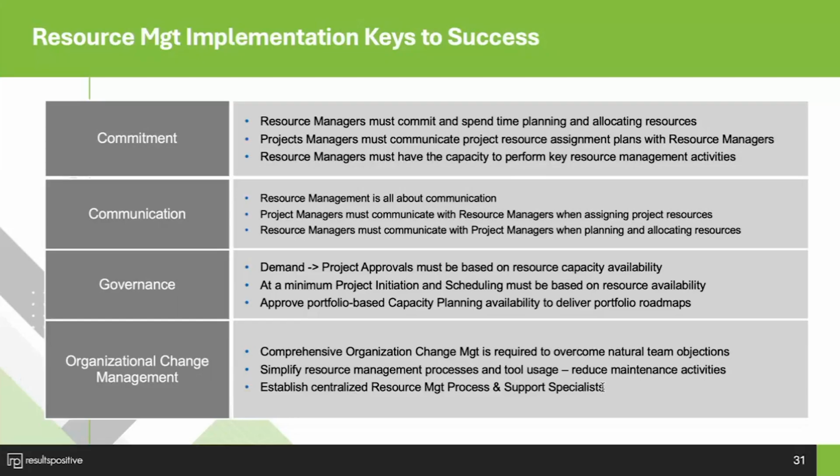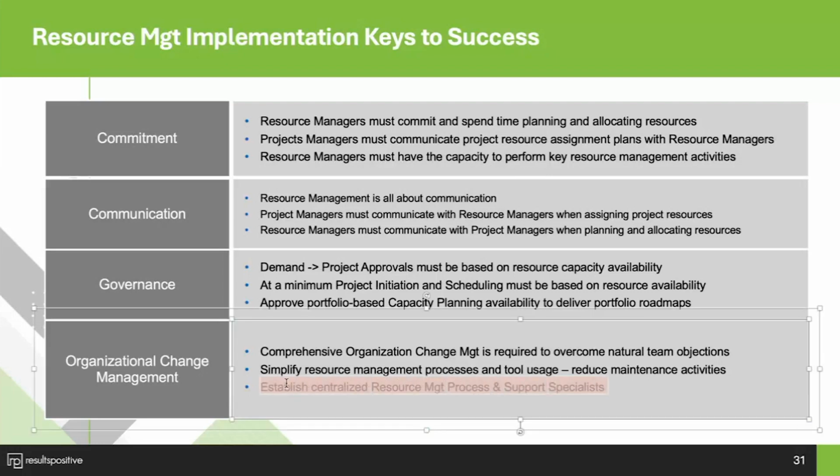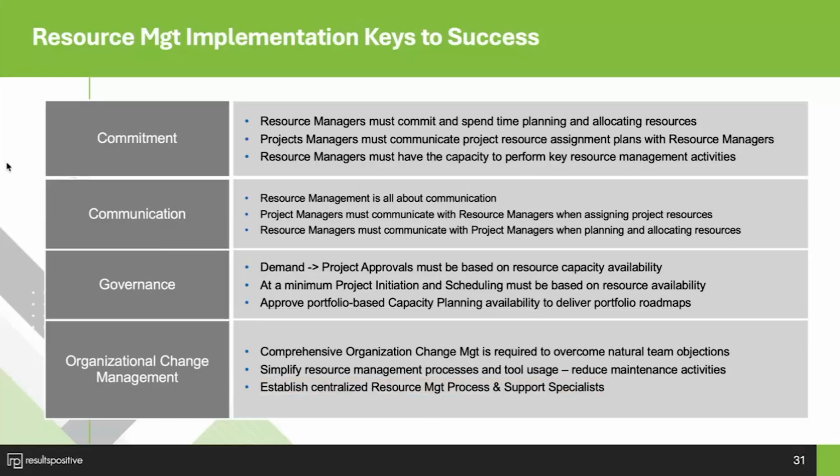The one thing that we have found over time to improve your overall resource management success, and this is typically if you have issues with resource managers not having enough bandwidth to support the resource management activities, is establishing 1 or 2 or 3 resource management specialists that are there to support the project managers and the resource managers, to validate that resource assignments and allocations are up to date, and manage and monitor that dynamic changing process. So that's a key thing to think about as you are implementing resource management.